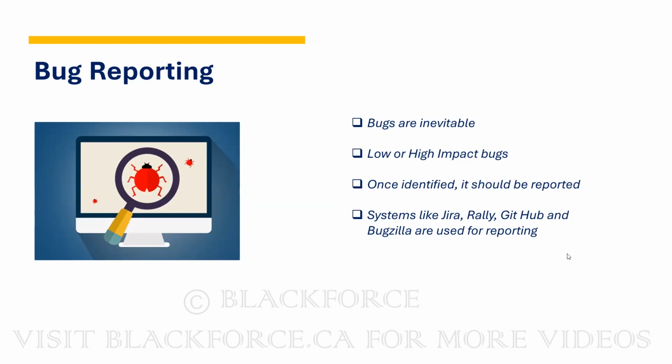But one thing you need to understand is that there will always be low and high impact bugs. Some bugs they call high impact. When you hear things like no-go decision or showstoppers, they say, oh, these are showstoppers. It means that we cannot release that application into production. You are building a Salesforce instance, and maybe in a field where you should have prospect, the prospect field is not working, and that is a mandatory field. They will call it a showstopper. You can't release that application into production. So we call it a bug.